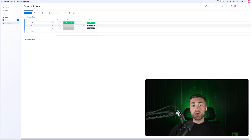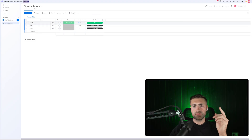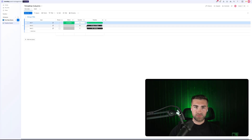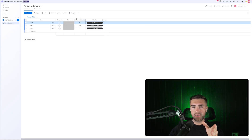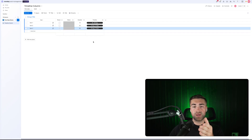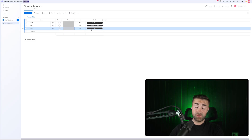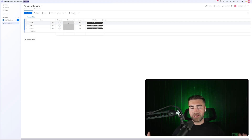If you change the duration to 20, it will add 20 days from the start date automatically. If you change it to 10, it sets today's date plus 10 days. If you enter 50 days, the timeline spans from the start date — for example, August 25th — all the way to October 31st. The duration column is quite helpful and feeds back into the weekend enabled/disabled settings as well.